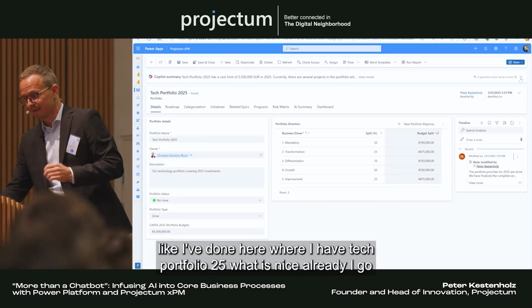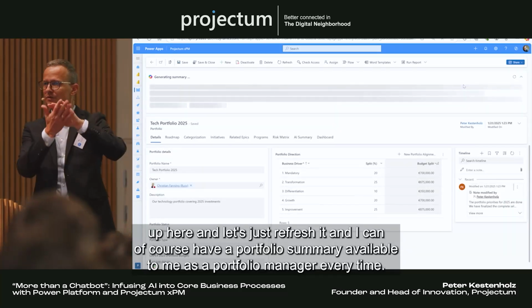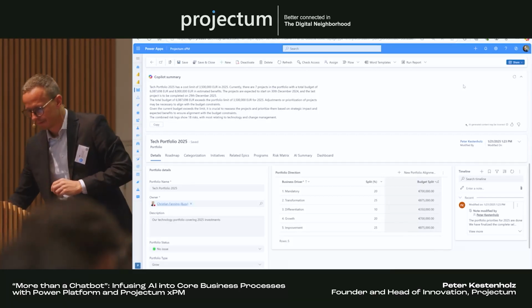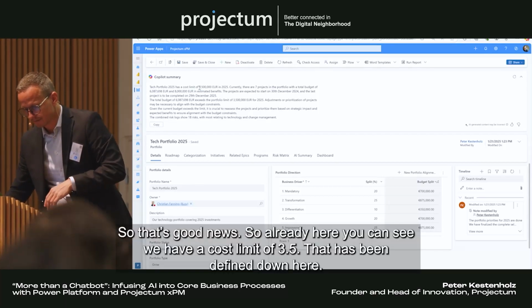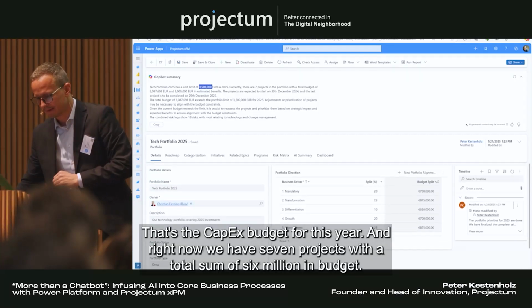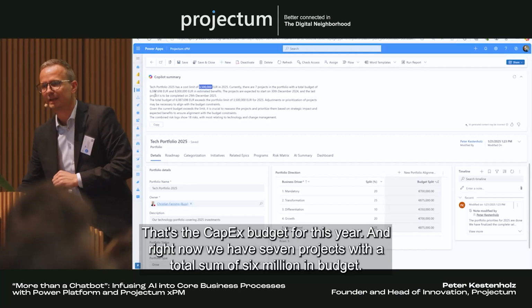What is nice already, I go up here and let's just refresh it. And I can, of course, have a portfolio summary available to me as a portfolio manager every time. So that's good news. So already here I can see we have a cost limit of 3.5 that has been defined down here. That's the CapEx budget for this year. And right now we have 7 projects with a total sum of 6 million in budget.